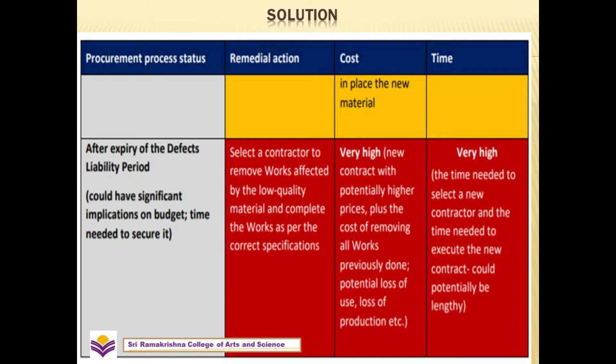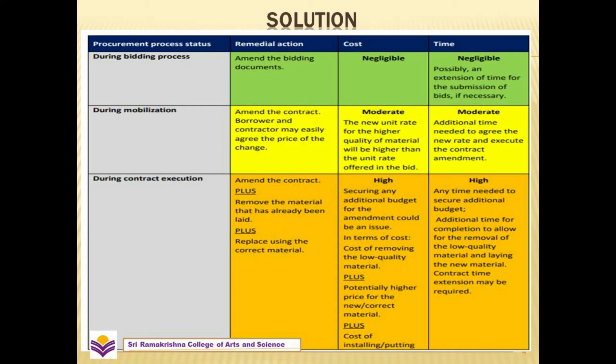Simultaneously, the time incurred would be high. The time needed to select a new contractor and execute the new contract could potentially be lengthy. To recap the entire case analysis: if defects are found in the bidding process, the remedial action is simply to amend the bidding document — cost and time would be negligible.